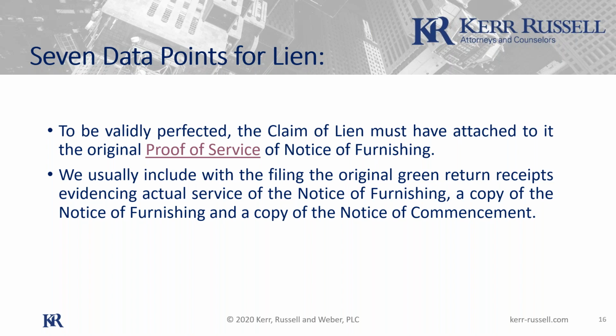well, we discussed this with the computer system being down, and we decided that the only way to protect yourself if you were on the last day would be to do what you did, which is to come in and get proof that you were here. Because sure enough, the next week when I got back my lien from the electronic filing system, it was stamped the next day, the 3rd, which would have been the 91st day, and would have led to a huge hassle trying to submit affidavits and stuff that we'd sent it in the day before,